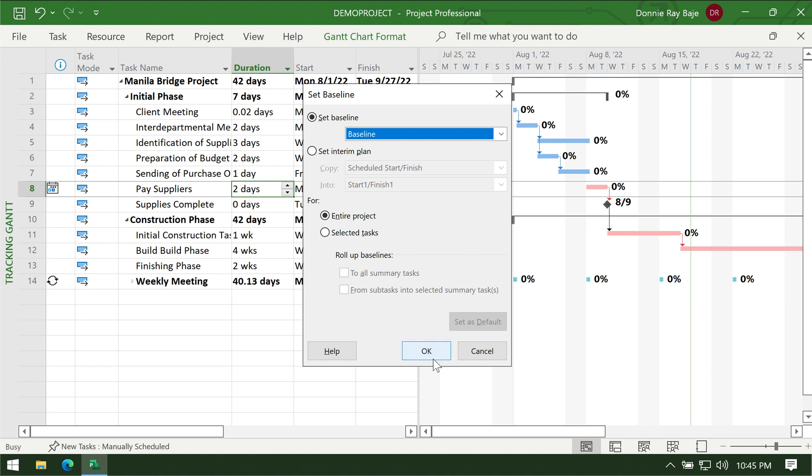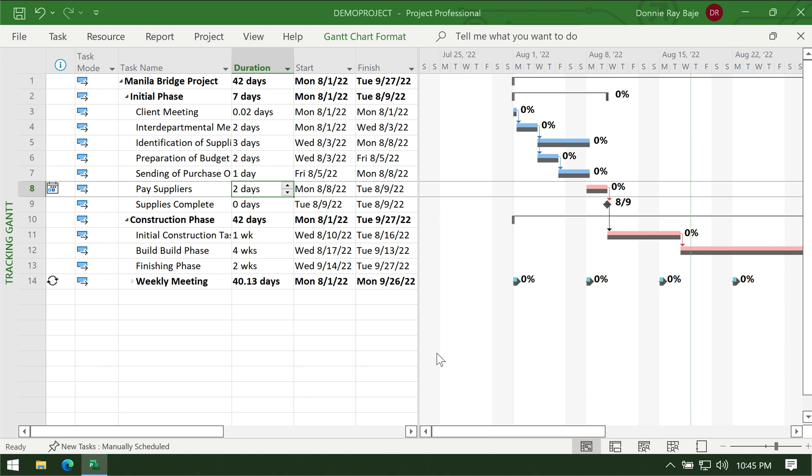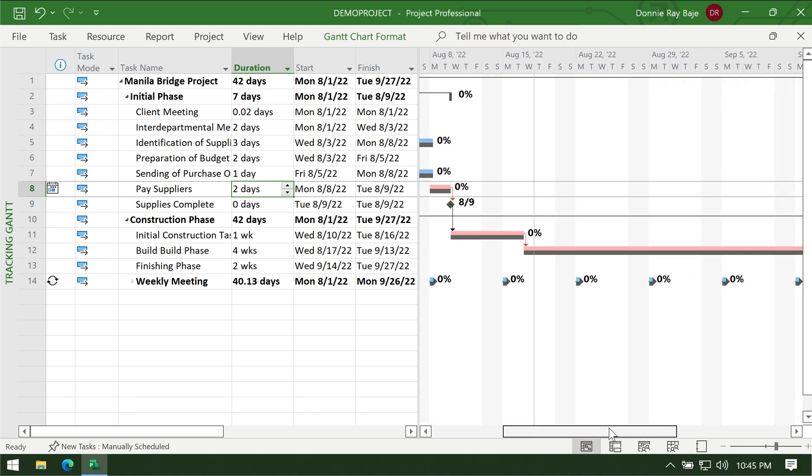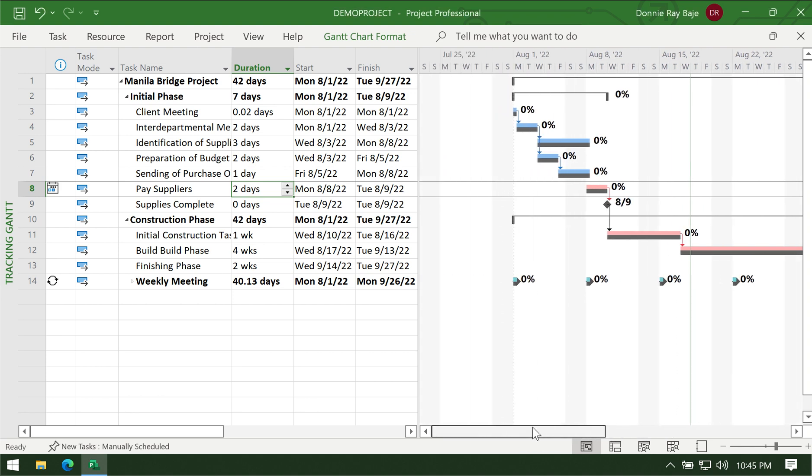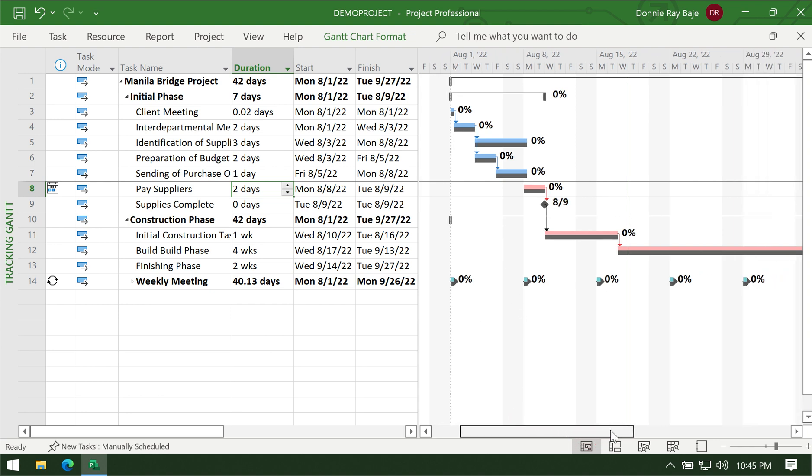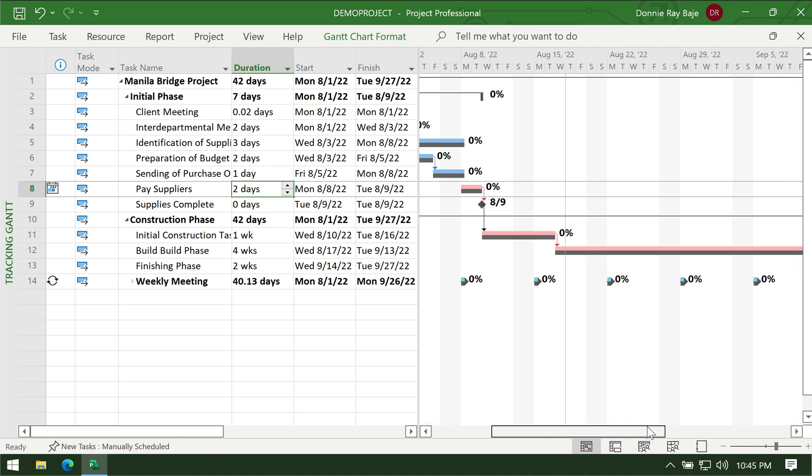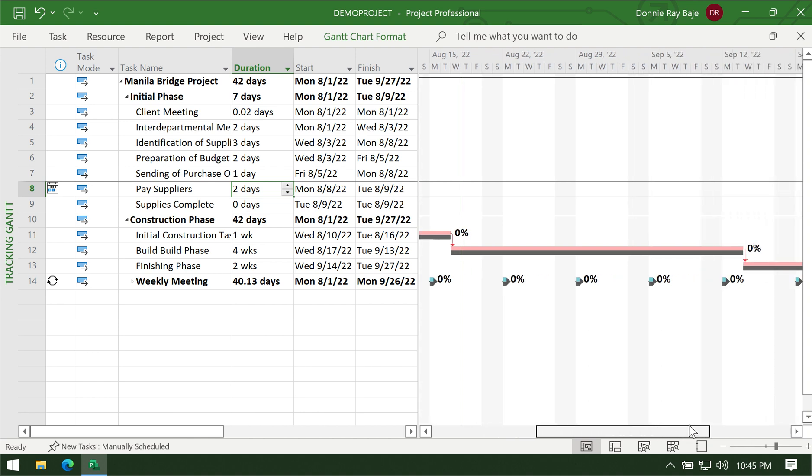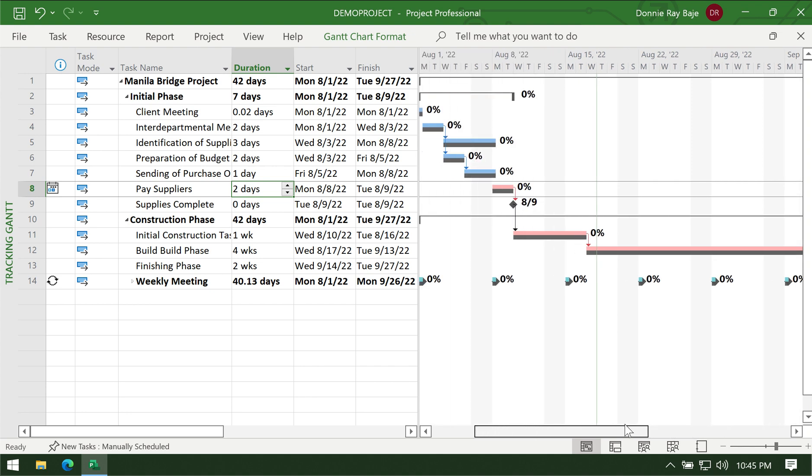Click OK and that's it. Once you have your baseline set, you will notice that your Gantt chart will now update with colors, with those gray bars. Those gray bars signify the original dates for that task.